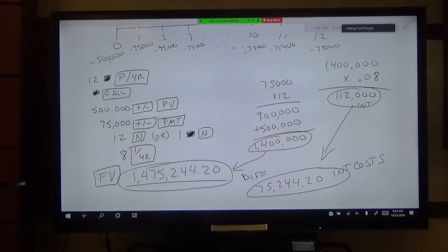And so what happens is that some of these lower bidders know inherently that change orders are going to happen, and they see the change orders as the way to really get increased profit. Now, I would argue that, number one, they probably shouldn't do that, but at the same time, it is a change. That was not what was bid on originally. So now is in one sense their opportunity to make those sort of changes. Any thoughts from you guys out in the Zoom gallery or in here in the room?